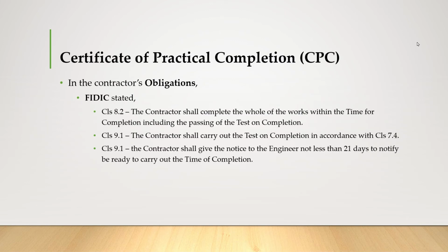So in FIDIC, the contractor's obligation is stated under clause 8.2: the contractor shall complete the whole of the works within the time for completion, including the passing of the tests on completion. So in clause 9.1, the contractor shall carry out the tests on completion in accordance with clause 7.4. Also in clause 9.1, the contractor shall give notice to the engineer not less than 21 days before he is ready to carry out the tests on completion.